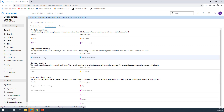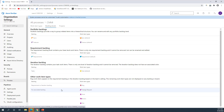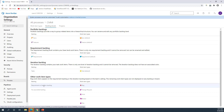You can also go to the Backlog Levels tab to see the hierarchy of work items — what should be at the portfolio backlog level, the requirement backlog level, the iteration level, and what other work item types exist outside backlog levels. Epic and Feature are portfolio-level backlog items, Requirements are requirement-level backlog items, Tasks are iteration-level work items, and other items like Change Request, Issue, Review, and Risk are not associated with any backlog level.